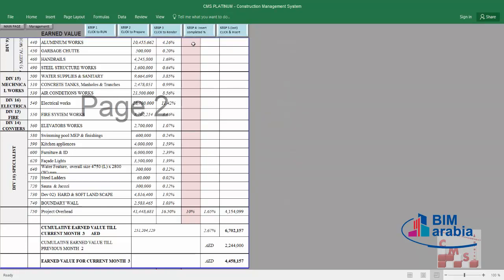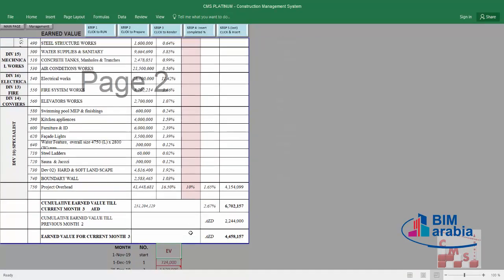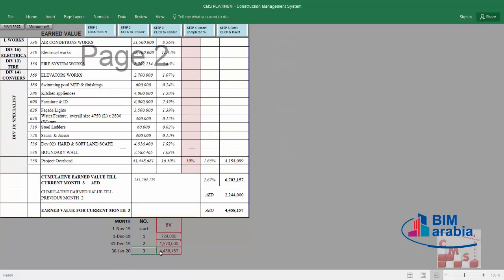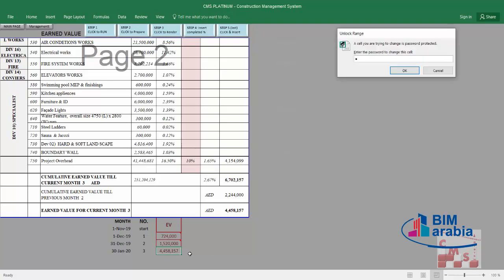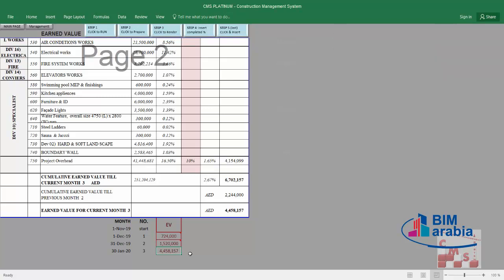After finishing step 4 — inserting the completion percentage — we go to step 5: manually inserting the earned value for the current month, which is month 3. Whatever value appears automatically for the current month's earned value, we add it manually. The reason we insert it manually is to save it for future months. We type CMS in capital letters and insert the number: 4,458,157. Now we have the total earned value and the earned value for this month.